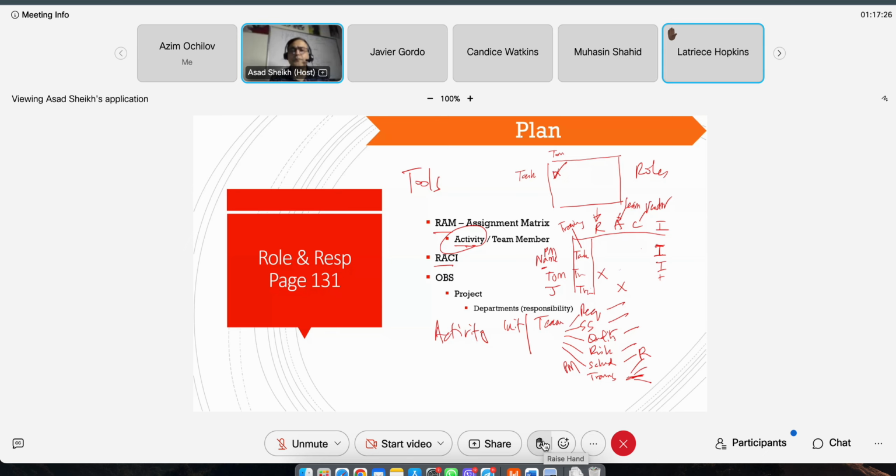So that I'm clear, my original question was, what's the difference between the person that's accountable and the person that's responsible? If I'm understanding correctly, the person that's accountable is accountable for the task and the people who are performing the task. You got it. And the responsible is the guy who's actually doing it. He is responsible to get it done. And accountable is the person who's sort of overseeing, the supervisor, overseeing that.